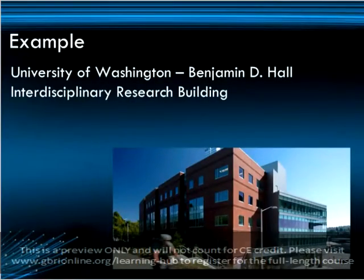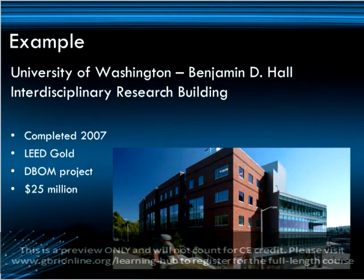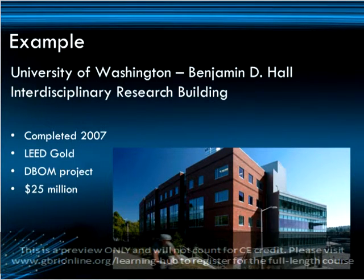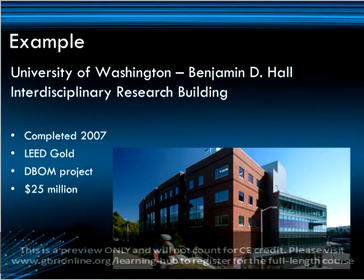We will now look at a case study of a project that used BIM technology throughout the project lifecycle. The Benjamin D. Hall Interdisciplinary Research Building is a LEED Gold project that also won a BIM award in 2007 from the AIA for technology and architectural practice. The project is a 150,000 square foot education facility that operates as a core and shell project so that each lab can be designed for the specific needs of the researcher. The project was set up as a design-build-operate-maintain competition and required a 30-year fixed cost of operation.